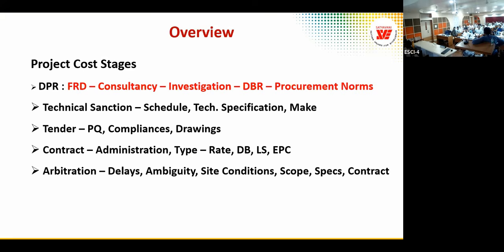In fact, I had a project where 20 acres was the project site. We could only hand over 16 acres after the letter of award. So 4 acres is not there. Then which drawing will you release for construction? If the contractor uses that 4 acres drawing and says you have stopped my work... The good for construction drawing is only a contractual requirement, but not a license to change. But it should not deviate from it.